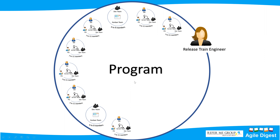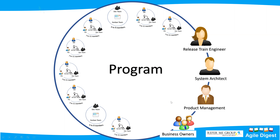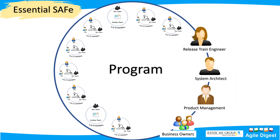This boundary is called a Program. If I have multiple teams, I align all the teams in one boundary or area — that is called a program. As a team I had three roles: Scrum Master, Product Owner, and development team. When talking about a program, that boundary itself is a team of teams. It has roles: a Release Train Engineer, a System Architect, a Product Manager or product management team, and a Business Owner.